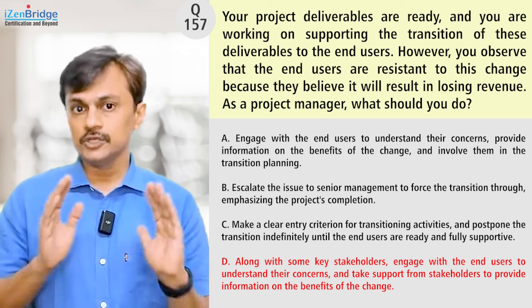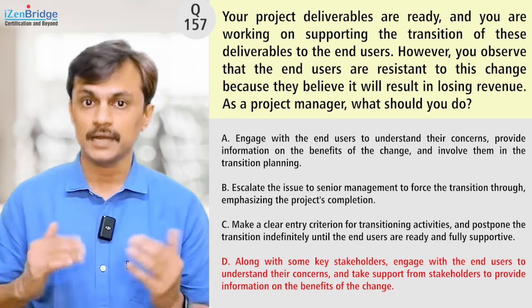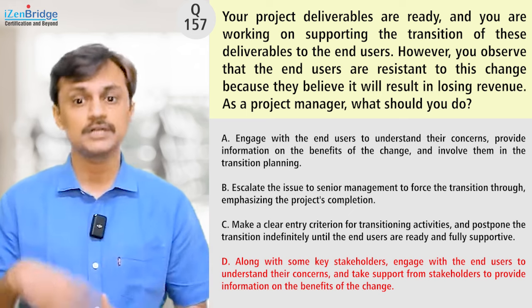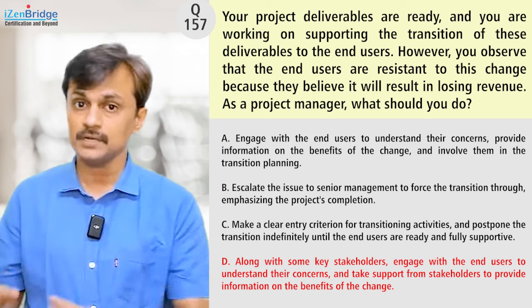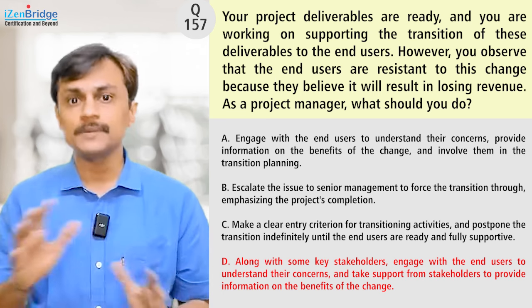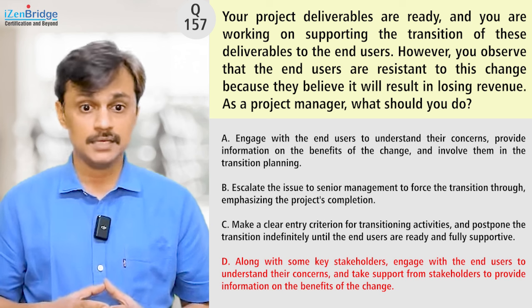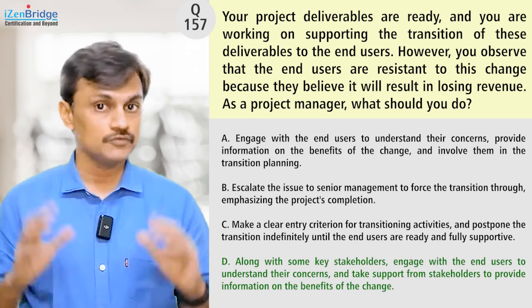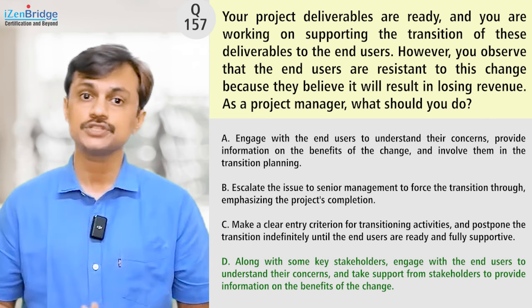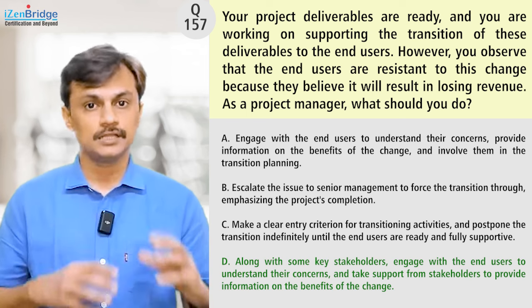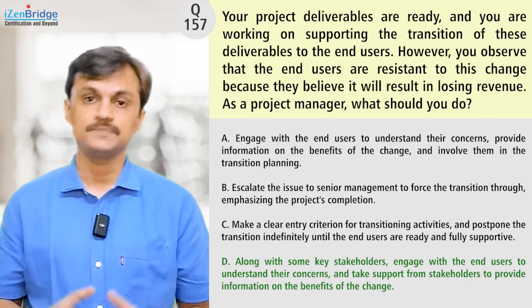Option D says you may need to take support from key stakeholders because this transitioning situation may not be directly controllable by the project manager. So, you involve those stakeholders, plan with them, and have them explain the benefits of the project and deliverable to the end users — bringing justification from them rather than you providing it alone — and then collaboratively figure out how to move forward with these transitioning activities. This is something better than A because when supporting organizational change, we are not the sole player. The rollout plan and other activities are not completely owned by the project manager; they are owned jointly by the group managing the change.